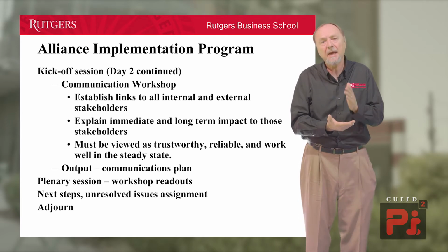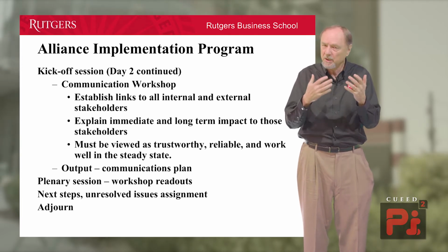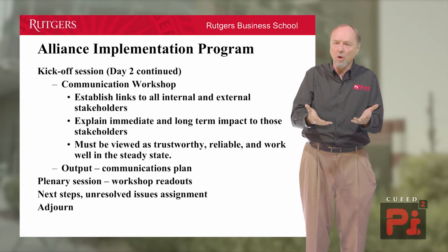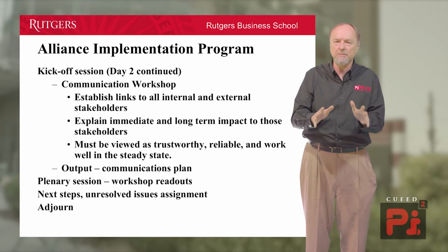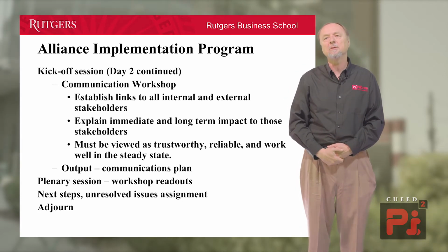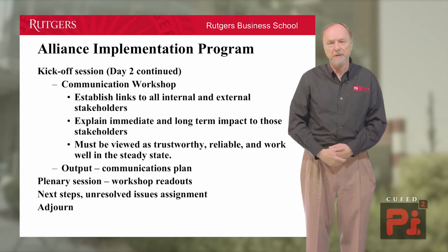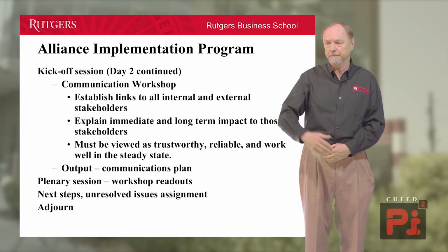This is not a one-time visit to my stakeholders. This is a visit that occurs on a regular basis. They know that it's coming, and it may be at their staff meeting. That's probably the best way to do it, but you're going to know when you see your own partner's internal structure. You'll be able to decide what's the best way for your partner to communicate to that stakeholder, and in some instances, you may be invited as well. So, the output is a communications plan.